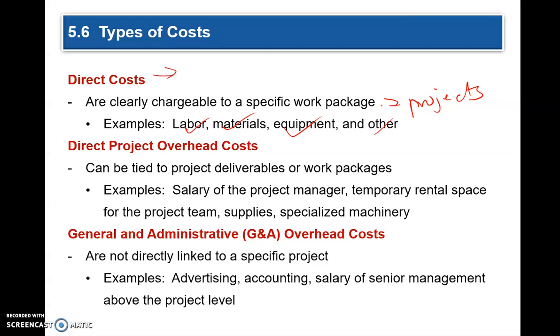Overhead costs are tied to the project deliverables: salary of the project manager, rental space if it is temporary, supplies, specialized machinery if you need something for a few days. Those are all overhead costs.